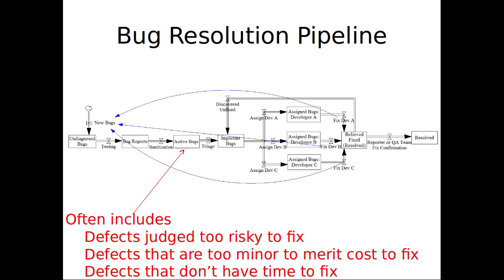Realistic projects have fault feedback ratios of perhaps 0.1 to 0.2. What that means is for every 10 bugs fixed, there'll normally be one new bug introduced at least. And often it's much greater than that, two bugs. For every 5 fixed, you introduce a new one, or higher. For students, I wouldn't be surprised if it's higher.